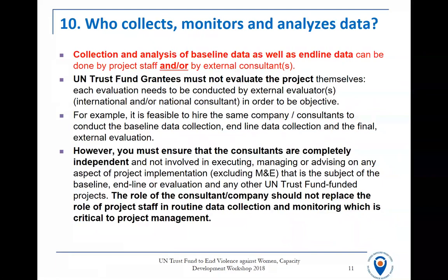You can hire consultants or other staff if you have the budget, if this is in your budget. You can hire people to help you collect data. But when it comes to the evaluation, it has to be someone external. And we wanted to give you a tip that if you want to hire the same company or consultants to collect the baseline, endline, and do the evaluation, you're very welcome to do that, as long as you follow our procurement guidelines and you get 3 quotes and make sure that you get a good, fair price.